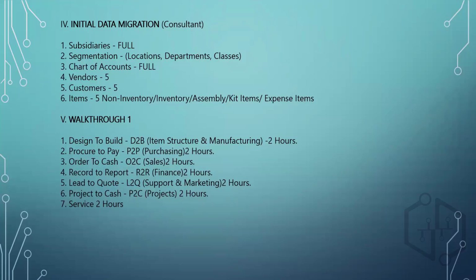After setting this up, you can ask me why they have to send samples. We can also create a test vendor, test customer, and test item, right? The basic idea behind asking them to send sample data is they have to get acquainted with the data migration templates that we send them. There are standard templates, as I mentioned earlier, right? They have to get used to these templates, because later on they have to fill in 150, 500 customers, 150 vendors. So they need to understand what field has which data. So in order to make them comfortable with these templates,